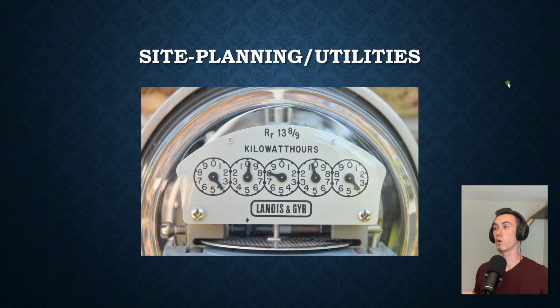Now, of course, before you build a house and potentially before you design a house, you ought to know where it's going to go because that can have a large impact on the way you design it, where the door accesses are, where the windows are with the sun, you name it. I mean, if there's a utility thing, like the electrical's over here and the water's over here and all this stuff, it all matters. It all affects the build. And so you ought to be familiar with, hopefully you've got some land or you know what land you want to build on or something like that.